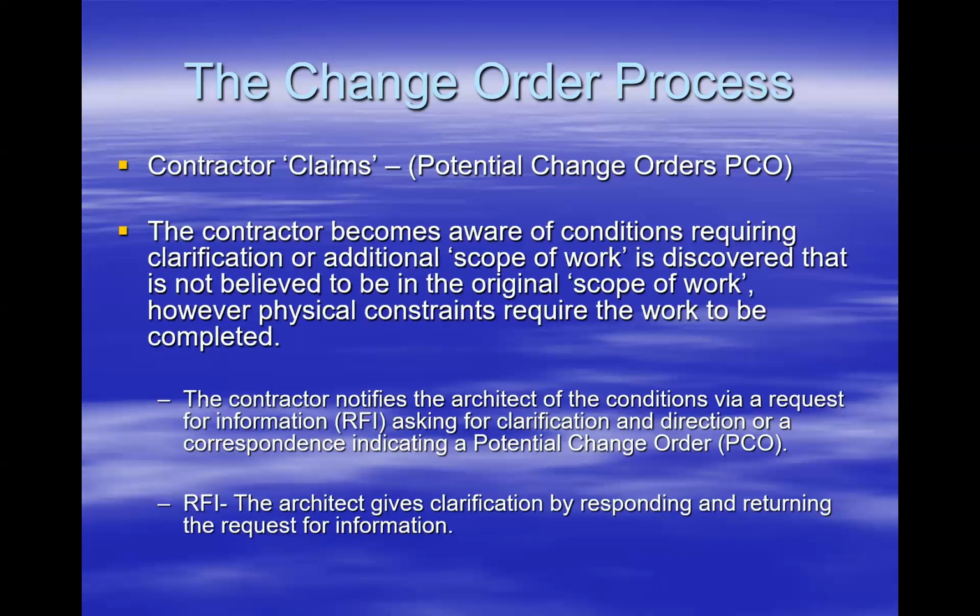What I was saying earlier also, there's been many times that I've put potential claim orders or change orders down. Because of the nature of the job, we were going so fast, we just documented it. We thought it was a potential change. And as I got back into my office and went through the scope of work and all the correspondence and different things, I determined that it in fact did exist in our original scope of work, and it is not an additional cost. And then I would just make that status suspended or whatever, but I would not pursue that in terms of a change order.